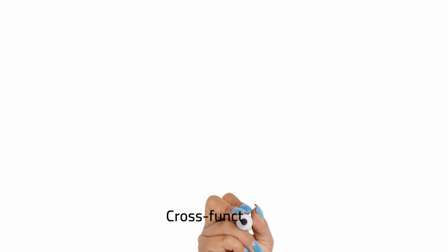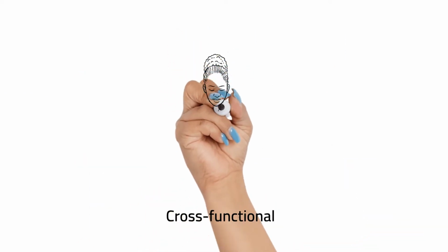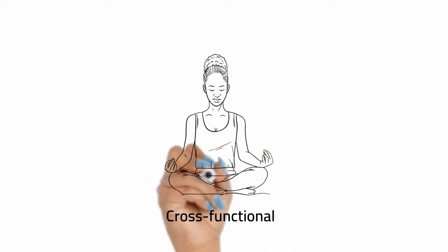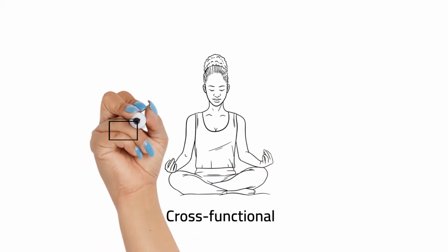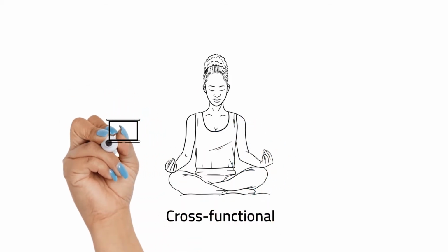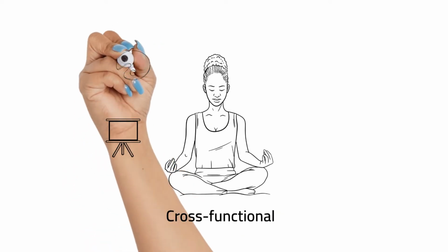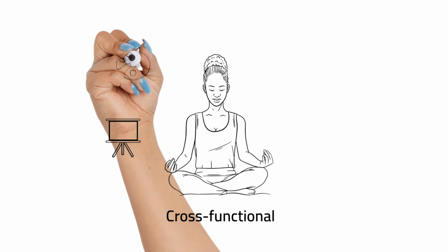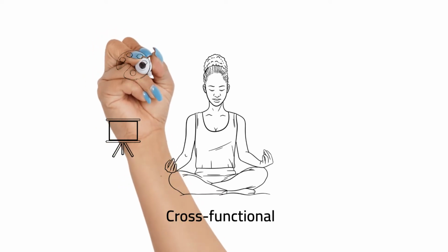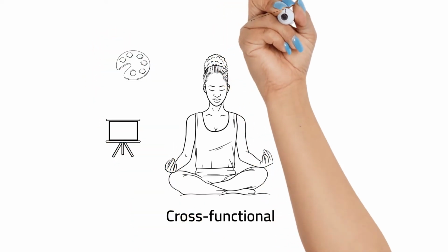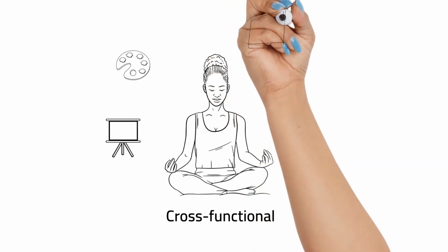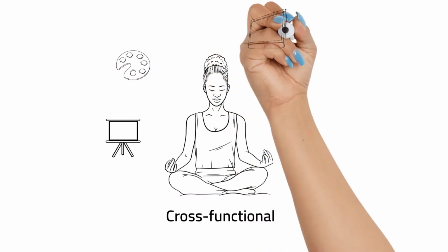Cross-functional horizontal teams are the desirable best practice in Agile. The official Scrum Guide says that Scrum teams are cross-functional, meaning the members have all the skills necessary to create value each sprint. That doesn't mean that each team member should be a generalist that can perform all the necessary functions. Instead, it means that a team as a group should cover all the functions.